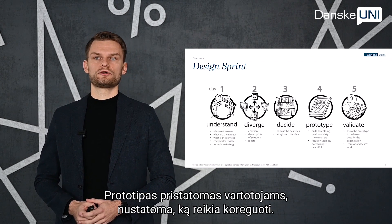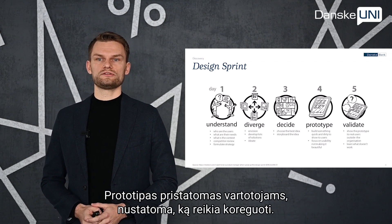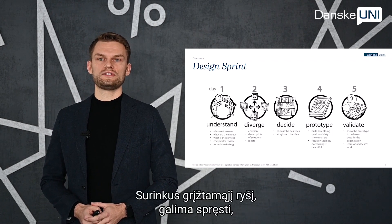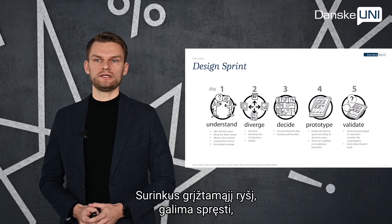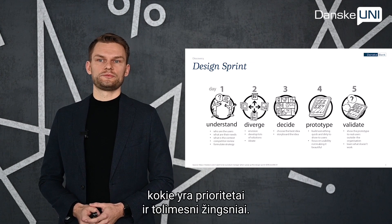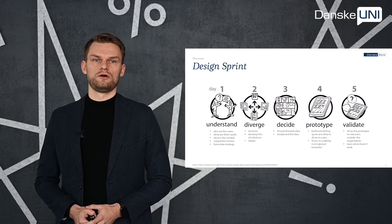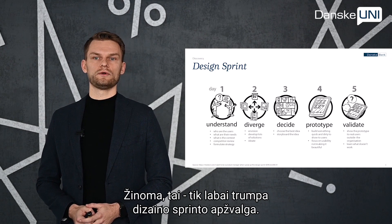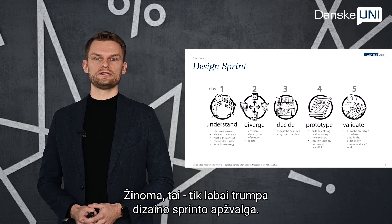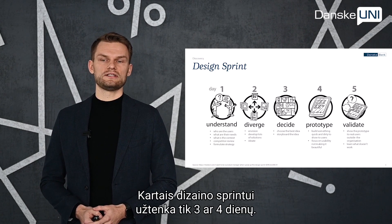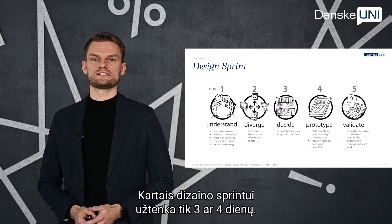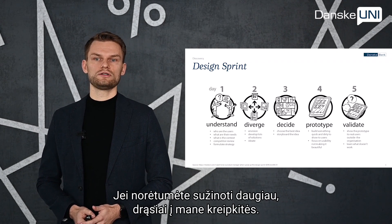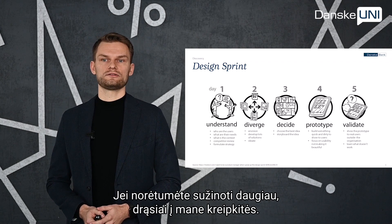Day five is when testing and collecting feedback takes place — basically when you show the prototype to end users and learn what works and what needs to be improved. After collecting feedback, it can be decided what are the priorities and next steps. Of course, it is just a very high-level overview of what design sprint is. Sometimes it is enough to have only a three or four day design sprint. In case you are interested or would like to know more, don't hesitate to reach me out.